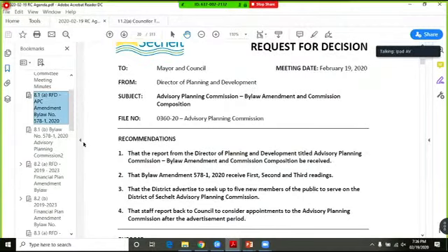So these are the design highlights. We need a 6x6 corner truncation of this design for the northeast corner of lot 5561 Wharf. You can see here that we need a little corner truncation because we don't have enough room to connect the sidewalk to Dolphin Avenue. So in order to get this 6x6 corner truncation, we are still trying to negotiate with this property owner to improve the parking a little over here.